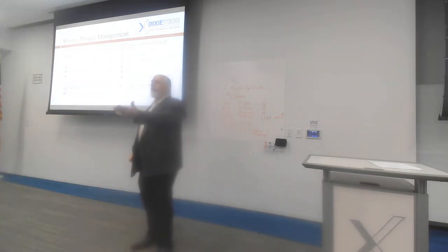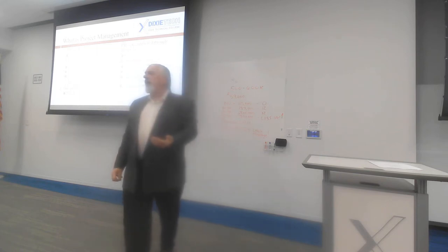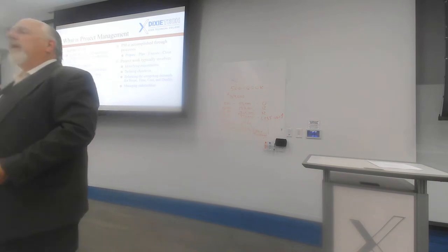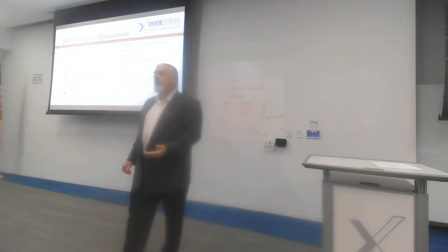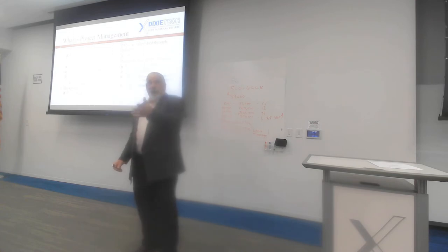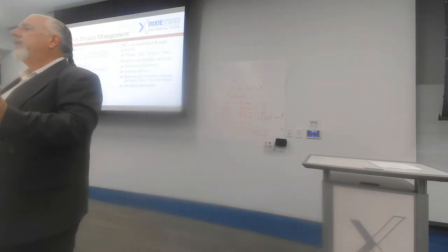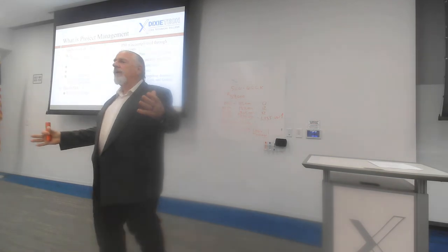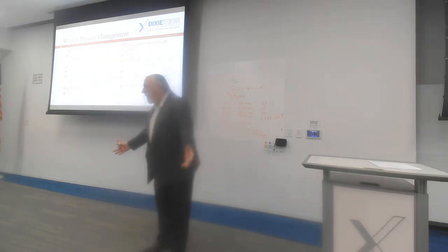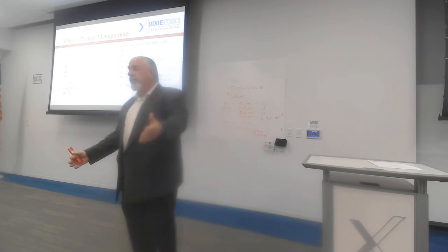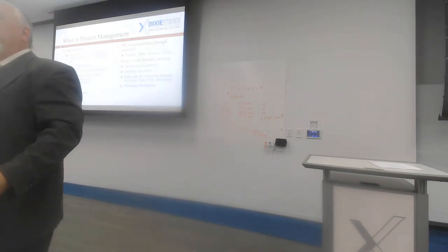Or, worse yet, we have that contention from within the organization. If it's a project development, we're trying to see if we can do something, the sales team gets a sniff that maybe we're working on this to check out the feasibility, and they start selling it. Well, it's not a product yet, it's a project. And so the tension of scope expansion is from within our own, we become our own enemy. Our sales team promises something that we are not even sure we can do. We're figuring out how to do it.